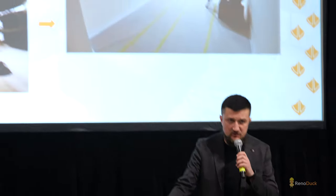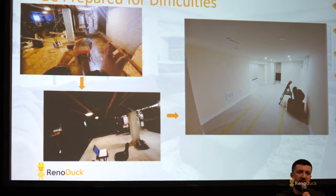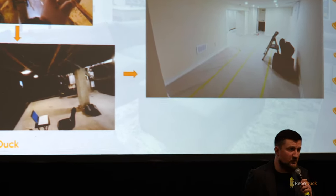And what does that allow? If your floors are really uneven, if your drains are really old, chances are your drains need to be changed. If you don't have waterproofing, chances are you have moisture coming in. So we say, okay, how about we just remove the slab, put all the new drains and the rough-ins in the right locations exactly where you want them, so now you can put the bathrooms and the laundries wherever you want without any extra relocation costs.